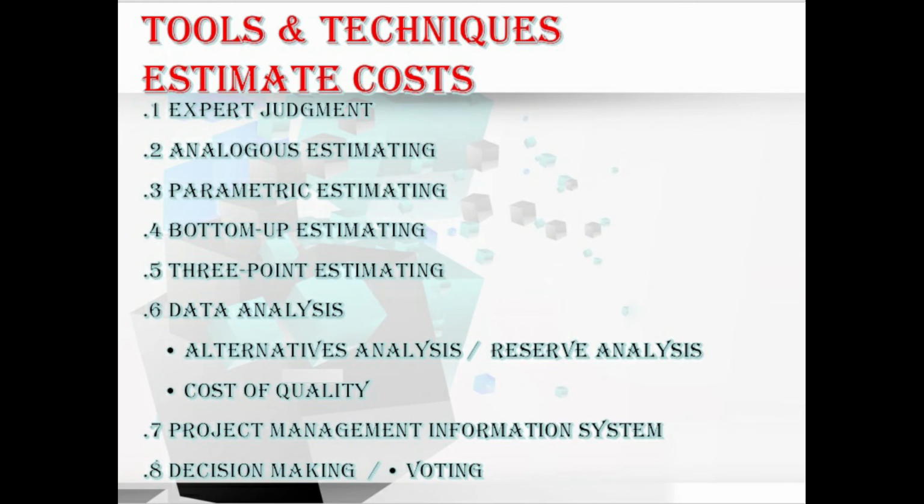Going to the next data analysis technique, reserve analysis. Here, proper project management requires the use of reserves to cover the schedule, cost and other areas of risk in a project estimate. Hope you remember how we have discussed this in schedule management. Reserve analysis involves identifying which activities on the project have significant risk and determining how much time and money to set aside to account for those risks.